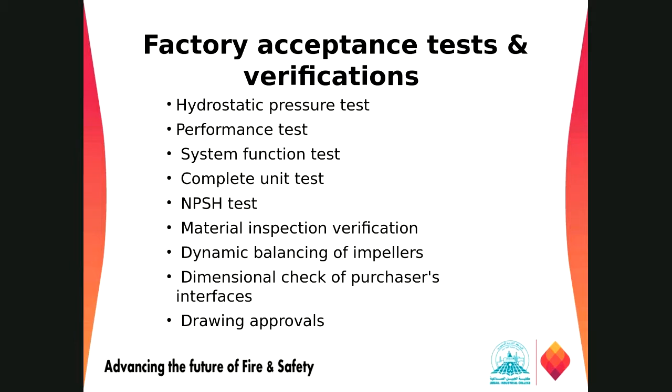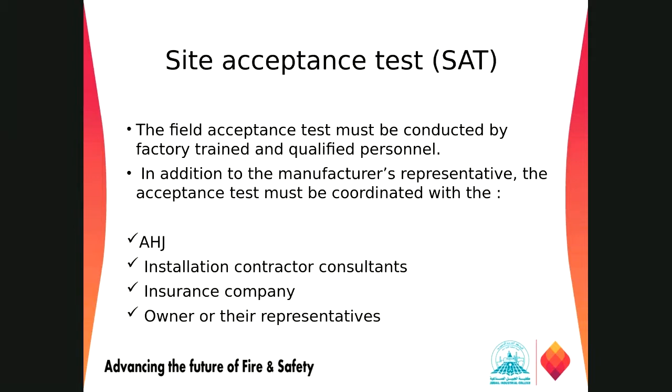Then we have the factory acceptance test and verification, right? So those are some of the tests. We have to look for the hydrostatic pressure test, performance test, functional test, NPSH test, which is net positive suction head, material inspection verification, dynamic balancing of impellers, dimensional check of pump interface, and the drawing approval. All those things we have to check from the data sheet and from the site commissioning report.